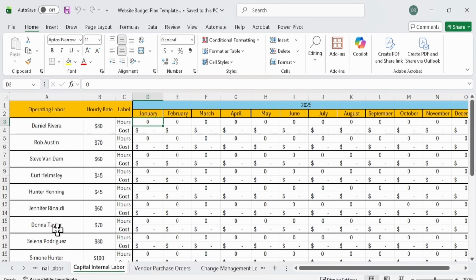So for the first step, the project manager will need to meet with all of the resource managers to understand what their availability is for this month of January, or if the resource managers are not available, normally the functional managers act as resource managers to get the hourly information for these resources. So what I'm going to do here is put in some sample data so we can take a look at this now.